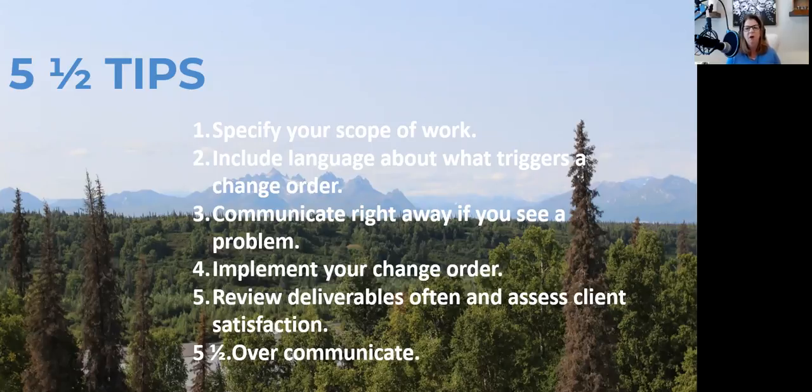This would be great for our new contractor here. But that's really not in the scope of our work. Would you like me to cost that out for you? And they said yes. And I gave them a price, and they emailed this morning and said they were great with that. So sometimes it works out and sometimes it doesn't, if you stick to your guns. So I'm really looking forward to this conversation, and I'm going to stop the share now.